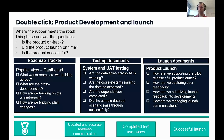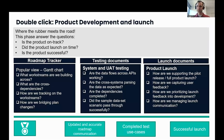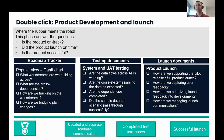The testing documents — I mentioned system and UAT testing. There are also unit testing and A/B testing. System and UAT testing is general across all different kinds of products you build. It's very important to understand the different elements that need to be tested: the data flows across APIs, the cross-system parsing of data, the dependencies, and the sample dataset scenarios. One thing that's missed a lot is that tech teams talk about the things they need to build within their own boundary. The integration timelines across these different boxes are frequently missed or understated because teams haven't sat together to figure out how the integration pieces work. I would suggest that the PM bring that up and make sure there's a lot of focus on the right timelines. In the testing documents, that gap really, really shows up.